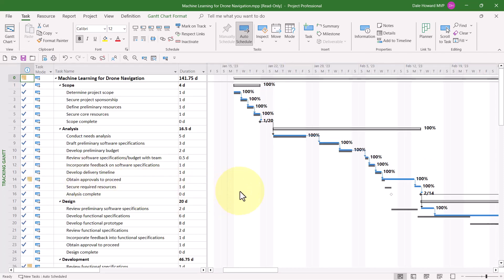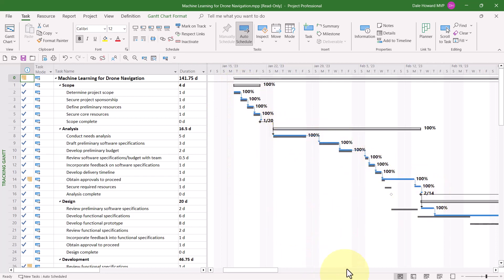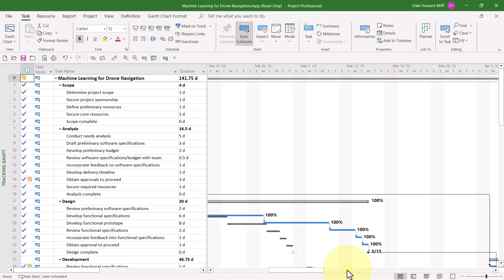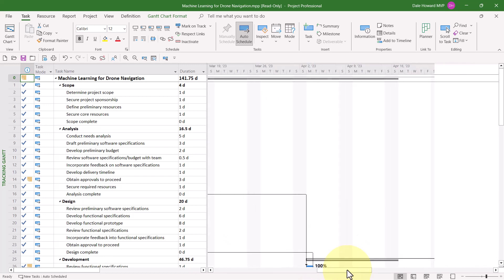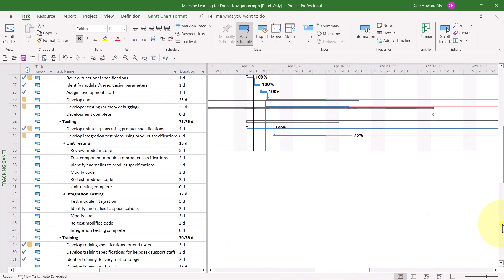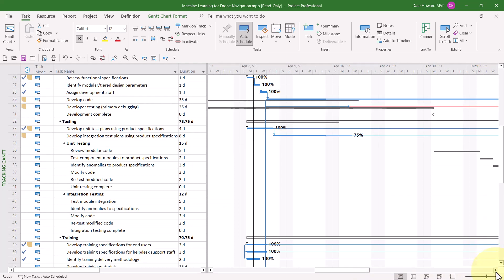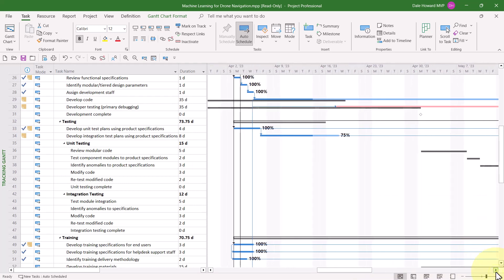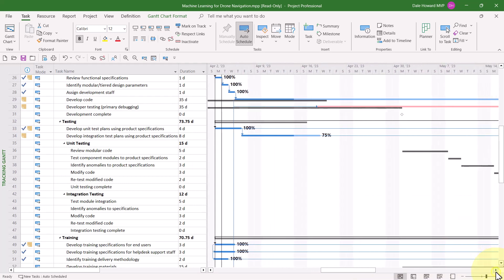In the Tracking Gantt view, you'll find up to three different colors of Gantt bars. Blue Gantt bars, such as I see here, represent either completed tasks or tasks that are non-critical, which means they can slip at least some without impacting the final finish date of the project.